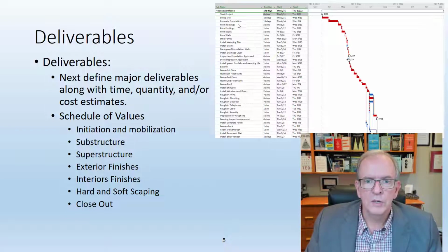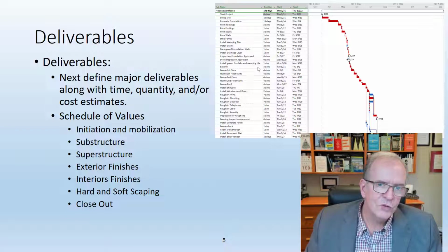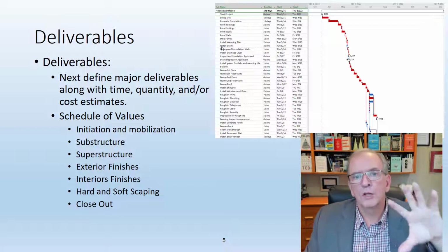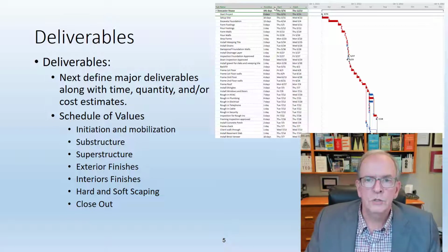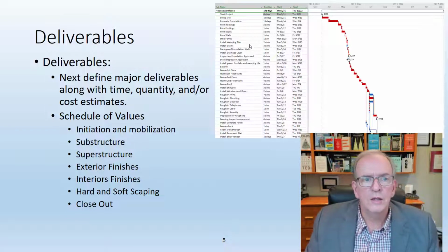Now this is just showing a list of activities and their connections, and it's giving you a critical path, but it doesn't have a work breakdown structure. It doesn't have detail of particular deliverables that are being offered. A work breakdown structure would definitely help to establish that. So you'd want to have more detail in that. You'd want to have